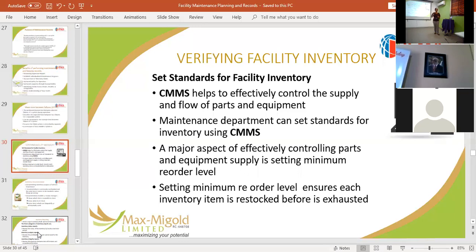I'll raise the work order, send it to the head office, from general procurement they'll pass it to the manager. Manager will say there's no money, they'll keep it under their laptop, they'll keep it somewhere. I think a month before I get it. So what am I supposed to do? I will order enough capacity. So your reorder level is just the minimum amount of a particular material you need to have in stock. CMMS is fantastic for all that area.